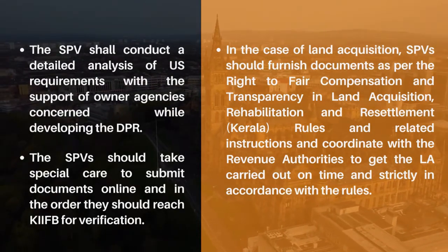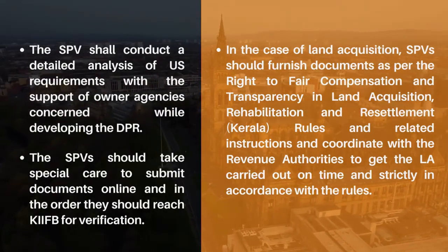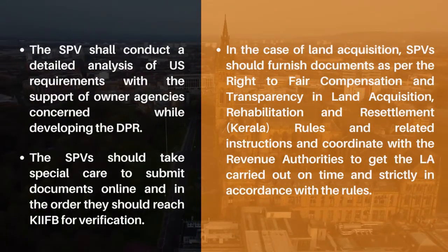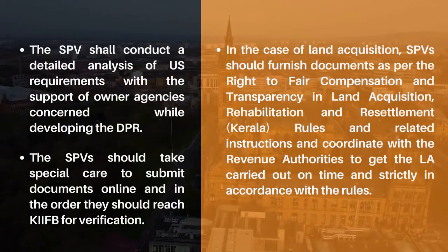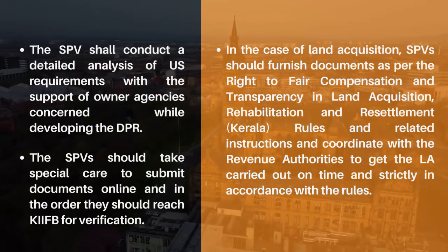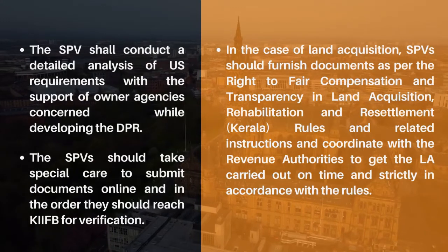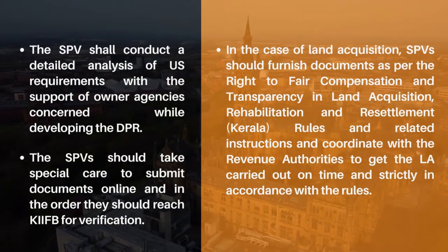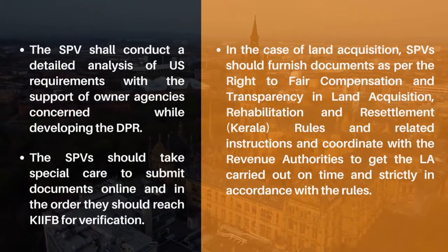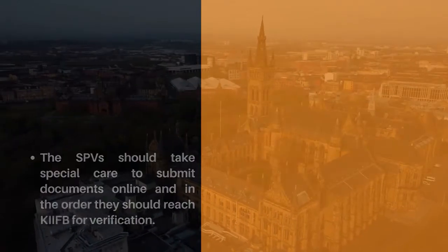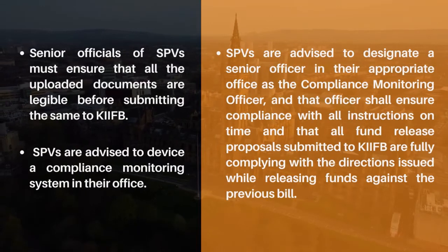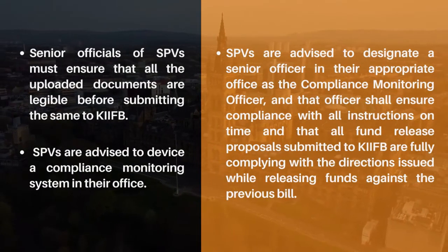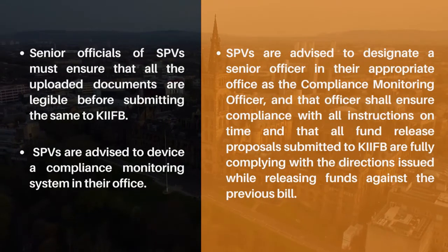In case of land acquisition, SPVs should furnish documents as per the Right to Fair Compensation and Transparency in Land Acquisition, Rehabilitation and Resettlement rules and related instructions, and coordinate with the revenue authorities to get the LA carried out on time and strictly in accordance with the rules. Senior officials of SPVs must ensure that all the uploaded documents are legible before submitting the same to KIIFB.